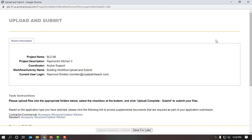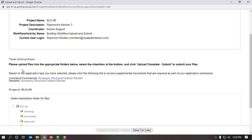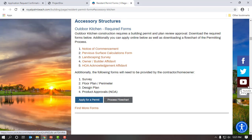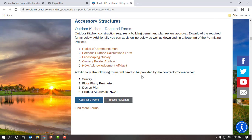I'm going to maximize this. Now we are at the eForm page — the Upload and Submit eForms. It shows our project number BLD86 and project description Raymond's Kitchen 3. Scrolling down, there are task instructions: please upload files into the appropriate folders below, and select the checkbox at the bottom once you have completed the submittal. There are two options: contractor/commercial and residence. I'm a resident, so I'll click on the resident option for accessory structure — outdoor kitchen. This takes me to a URL on the village's website detailing the specific files I need to submit: notice of commencement, impervious surface calculations form, landscape survey, owner builder affidavit, and all required drawings — survey, floor plan, design plan, and others.